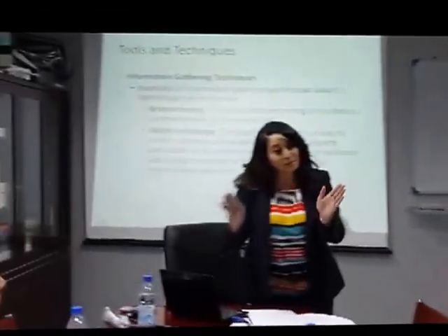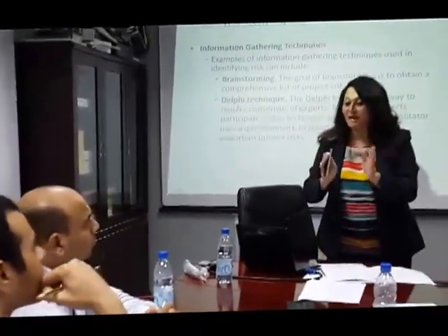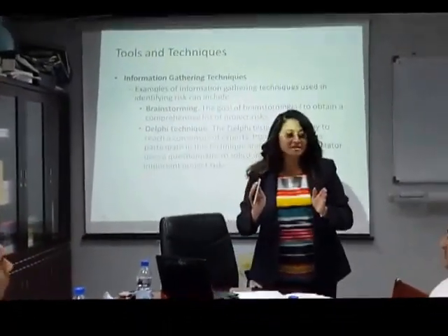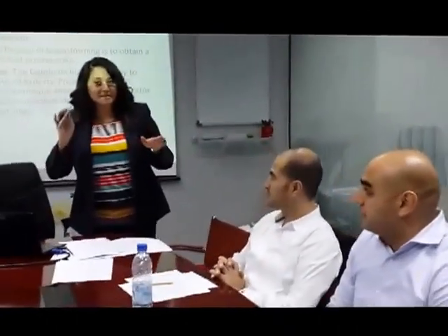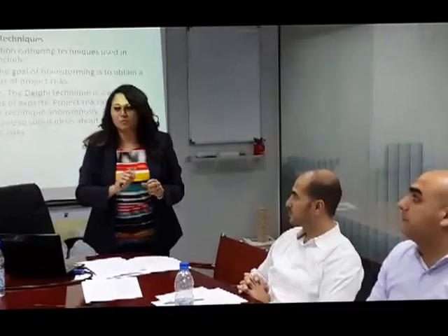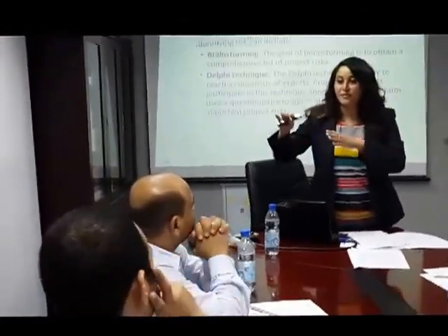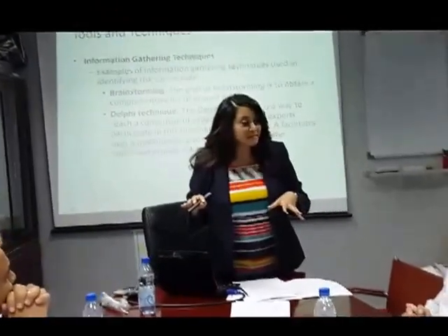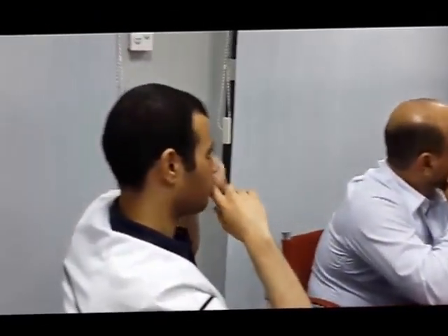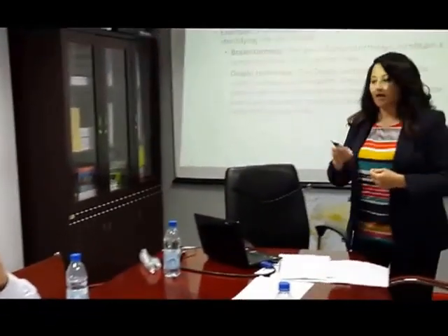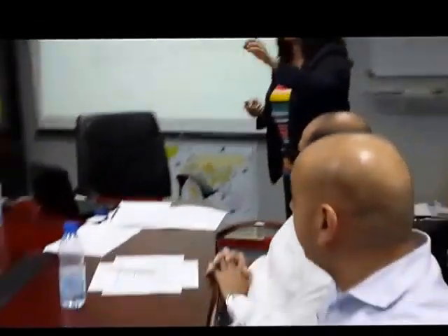We have experts. We don't want to put them face to face because this might create clashes, and they might be biased. They might hear the opinion of someone else and then be biased. So we send an email to these experts. We send them a questionnaire that they would answer, or we would ask their opinion on something. And then when we get the answers, there's a third party who studies the results. And then they would send another and another and another questionnaire until everyone agrees, until we get consensus on an issue. So this is the Delphi Technique, and it's very widely used. It's very good because, the important thing is, it's anonymous.